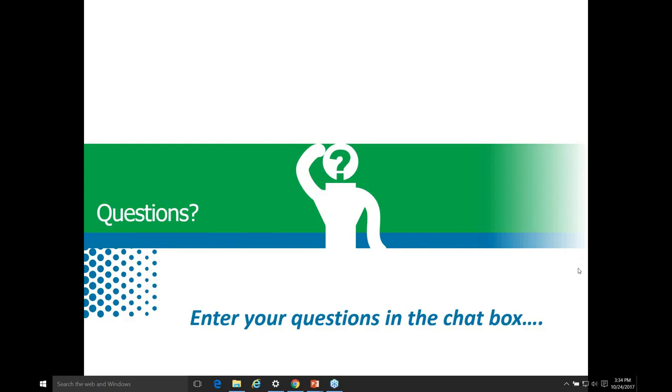Oh, and Gwen is helping us out on that first question. She mentioned that we usually do planning screens on new alignment projects, which is a great example. Thank you, Gwen. I was having a little bit of a brain confusion there, trying to think of an example. But that's a perfect example. A new alignment where a new road is being considered, that would be an excellent reason to use the planning screen. All right. And she also says we don't get much out of doing it on widening, and that makes a lot of sense. Thank you.